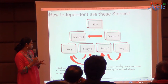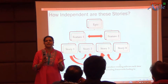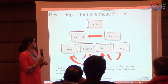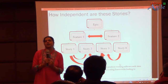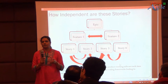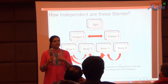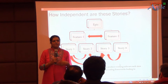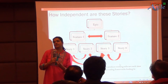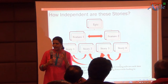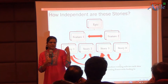How independent are these user stories? You'll have either data dependency or inter-team dependency. In Agile, in one particular sprint you'll work on three or four user stories. Unlike Waterfall where we start coding everything and then testing, in Agile every user story has to be coded, tested, and built. You'll always be having working software in a Scrum methodology. When you have dependencies, the problem increases — you won't be able to build a user story because of dependency on another product.